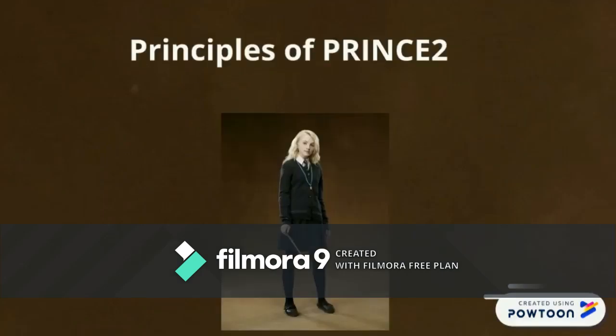Hello, Professor. I'm Luna. The introduction of management by exception in PRINCE2 smooths the administration and management of projects, because they define tolerances for the objectives, which seek to create trust in the work teams when they carry out their activities independently but controlled. They manage a well-defined organizational structure with clear and detailed roles and responsibilities in PRINCE2's organization.